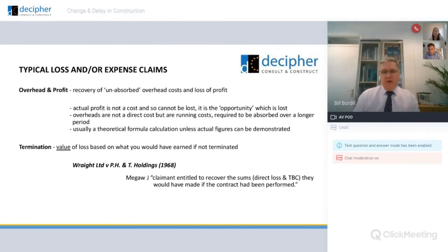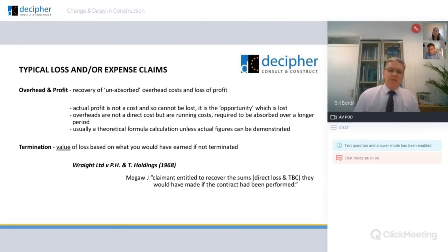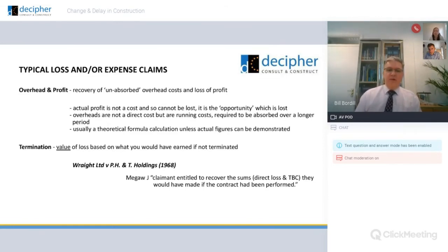Profits can't be lost. What you actually lose is the opportunity to make a profit. You can't lose something you haven't got, but you can lose the opportunity to make a profit. That's quite difficult to prove, but you are entitled to make a claim if you are indeed able to prove that theoretical loss.